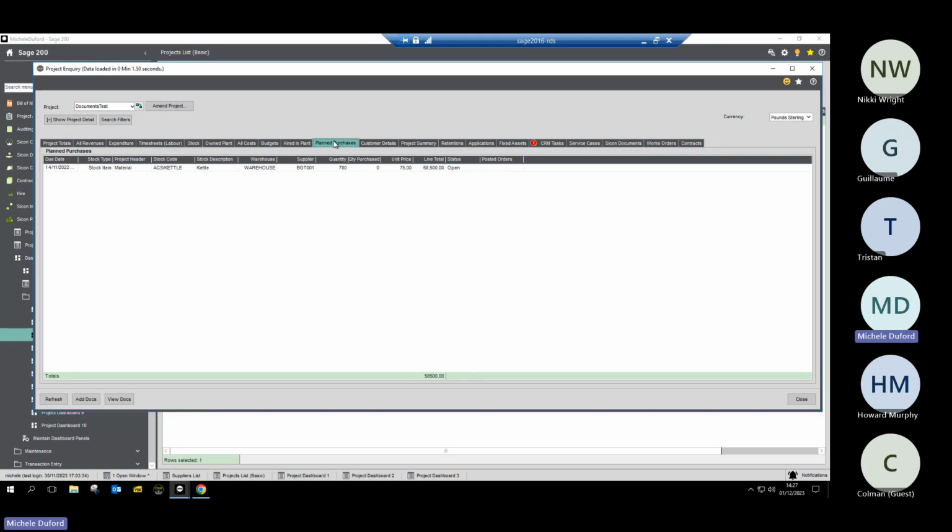And then there are utilities that will allow me to convert my planned purchases to purchase orders, so that I can see what we planned for, what we've actually done. So now I've got one step further back. So I can compare my materials budget to what we've planned to purchase, to what we've committed to purchase, to what we've actually purchased. All of that's more than achievable.